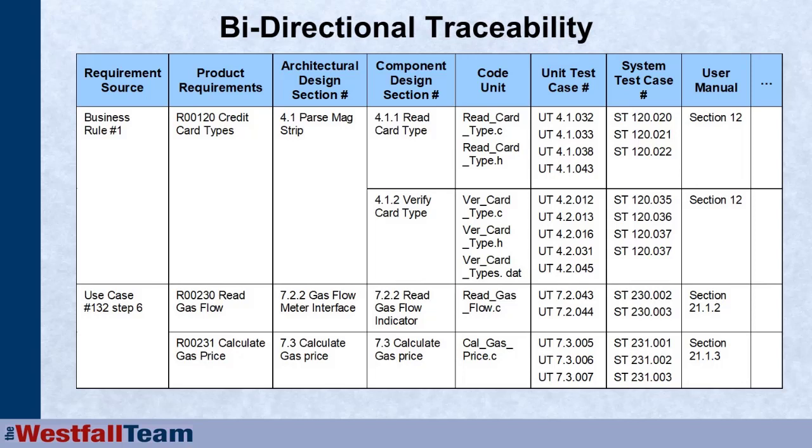And we can, as I said, pull from this, for example, just making sure that every requirement here flows down to the appropriate code, and that there are no modules of code that don't trace back to requirements, for example.